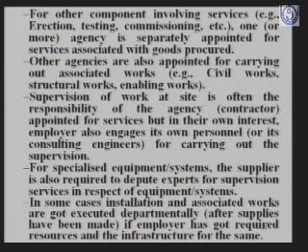The supervision of work at the site is the responsibility of the agency or contractor appointed for services, but in their own interest, the employer also employs personnel or consulting engineers for carrying out the supervision. And for specialized equipment, the supplier is also required to depute experts for supervision services in respect of the equipment system. In some cases, installation of the associated work is also executed departmentally by the employer, or the employer also gets resources from others.